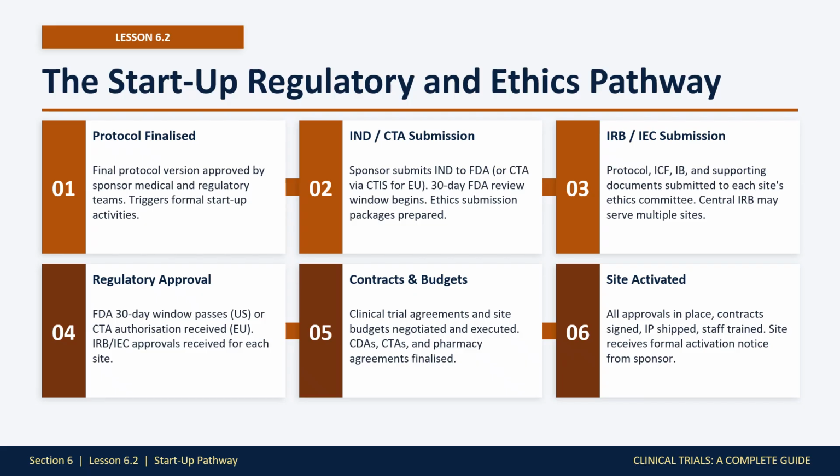Step 2. The sponsor submits the IND to the FDA or the CTA through CTIS in Europe, and simultaneously prepares ethics submission packages for each site. The 30-day FDA review window begins.